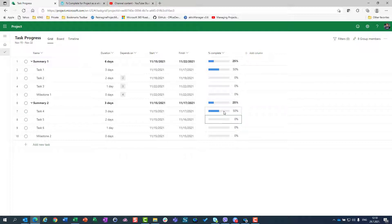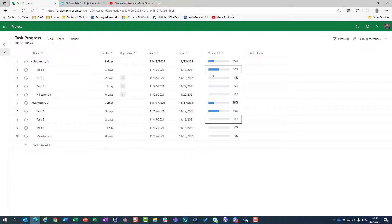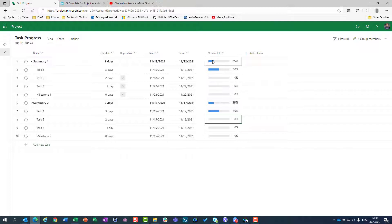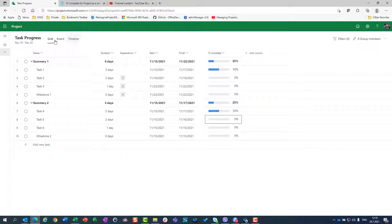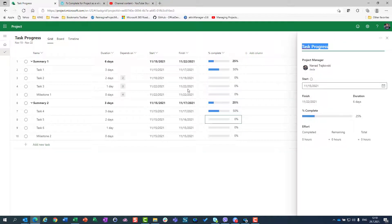It may be confusing because you can see that only one task is done, but the whole summary task is 50% done. And that is because this calculation is three plus two plus one day means six days and three days are done. So, 50% of the summary task is done. But you will not see here in summary two six days because six days are calculated when there is connection between tasks. But the result of percentage of completeness remains the same. So, if I put here 50%, it will result in 25% in summary two.